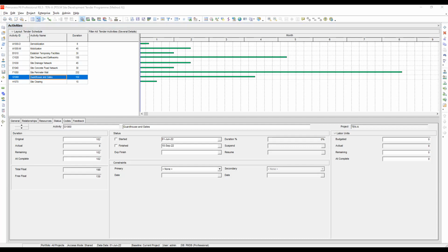Now all activities with corresponding estimated durations are already added into our project. So our next job is to define project calendars. Let me give you a brief insight about calendars. A specific calendar assigned for a specific activity is very significant because it contributes to realism and accuracy to project duration.